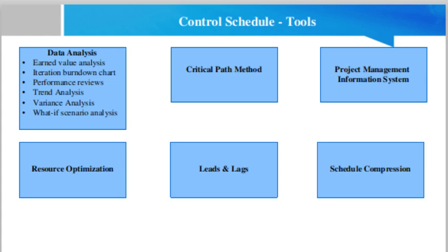Comparing the progress along with critical path can help determine schedule status. The variance on the critical path will have a direct impact on the project end date. Evaluating the progress of activities on near critical paths can identify schedule risk.